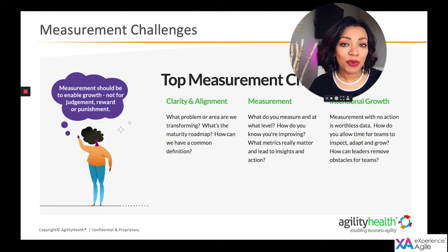The most important message that I have for you today is never use these measurements to punish or reward or judge a team or their management team. If you ever do that, you will never see the truth again. Teams know how to game any metric. So as long as these measurements, whether they're qualitative or quantitative, are used to help the teams grow and your organization to grow, then that will be successful. The moment that you start using them for punishment, you'll never see the truth again.